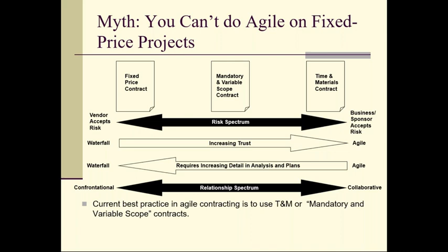These work orders will say the name of the phase, or which iteration this is, and which specific features the client wants us to work on for that iteration. Beside each feature will be how many points it is, and that list should not exceed approximately 50 points, which is approximately $100,000 worth of work. So on average, each of these iterations, these work orders, should total about 50 points or $100,000 worth of work.